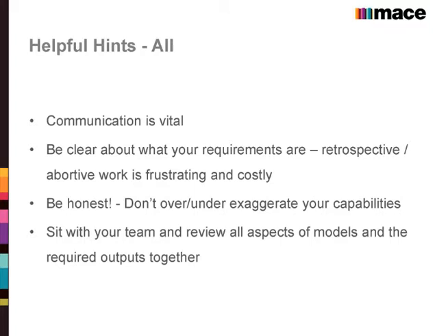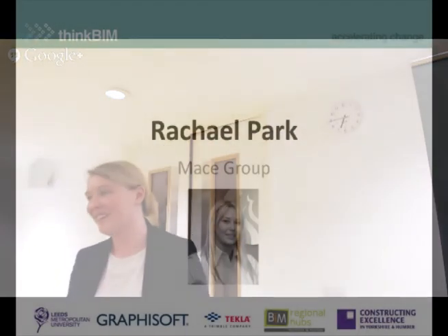And again, sit with your team, review all aspects of the model, not just for 5D capabilities, because what you might label as a 5D might have a knock-on effect when you do logistics or your 4D. So everyone sit together and actually talk through this. And you know, this is from experience. Anyway, so the end, hopefully, a bit more of a practical approach. If you have any pains, I'm sure I can share it with you.